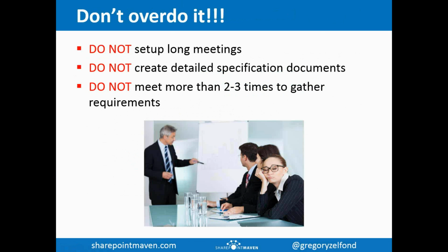Okay. Do not, as I mentioned previously, create detailed specification documents. This is just not necessary. This is a waste of time for you and your users. And also, do not meet more than 2 or 3 times to gather requirements. Once again, if you are just migrating documents, or just building regular out-of-the-box web parts, you can get that information in the first meeting. There is no need for you to meet 2 or 3 times and ask the same question over and over again.